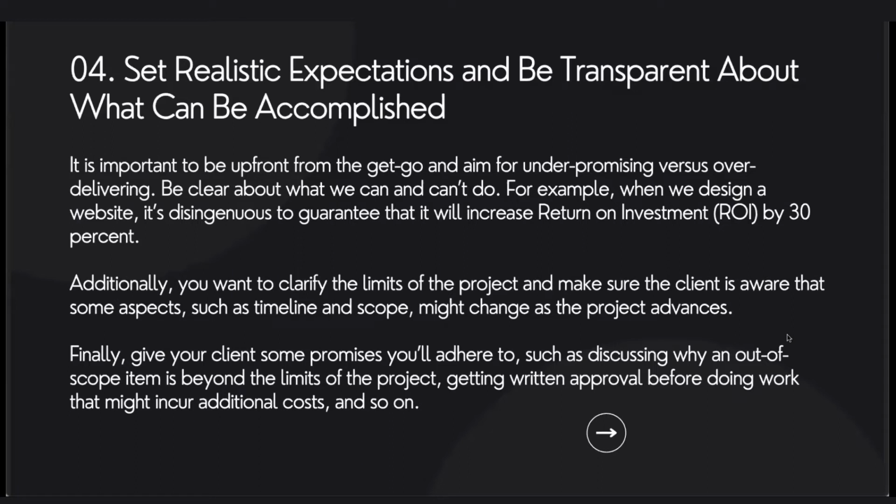The other thing that is so important is the scope of work. We're going to promise the client, or you're going to promise the client, these are the deliverables and this is what we're going to do. We're going to give you a 10-page e-commerce website. We're going to do a first draft, a first revision, a second revision, and a final revision. I said it earlier. Or we're doing an SEO campaign and we're doing your LinkedIn and your Instagram. And then all of a sudden, because there has to be limits to everything, right, your client doesn't adhere to the scope. They go outside of the scope.